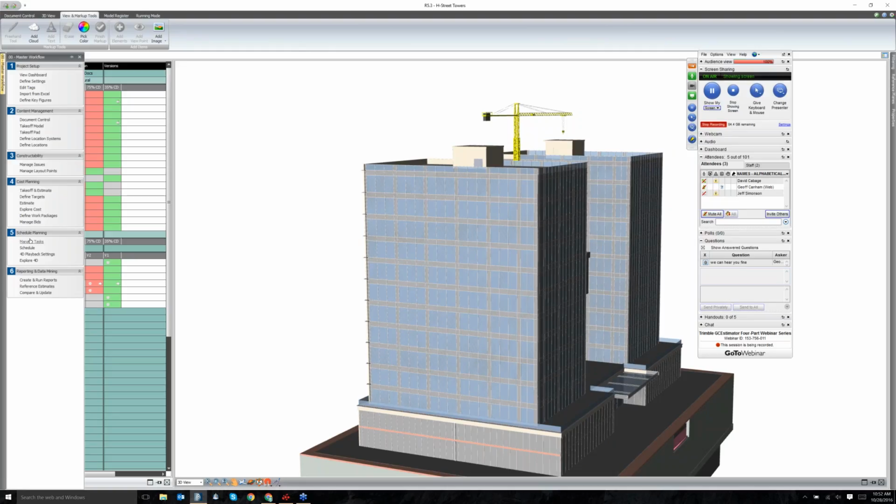And actually a whole, this is kind of a tangent and probably a subject in its own right, is schedule planning. Within Vico, you can actually do flow line scheduling, which is a little bit different than CPM. The difference is that we can actually add a third dimension, which is location. And we can visually view a schedule on a graph format, so we can identify places where we can optimize schedule or where we have overlap. So thank you for bringing that up. Vico can stand alone, and a lot of these modules can stand alone as well.